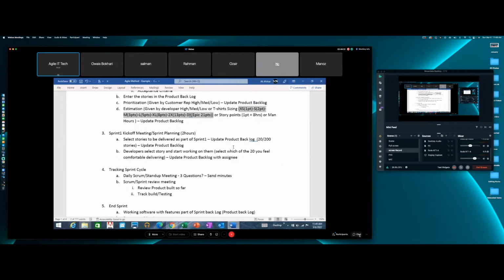And also, there's another way that we call planning poker, right? So what they do is they have these points on a card. Each developer will get 7 cards, right? One card will say 1, one card will say 2, 3, 5, 8, 13, and 21. You got it? So if you had 5 developers, all 5 would have these 7 cards, right?